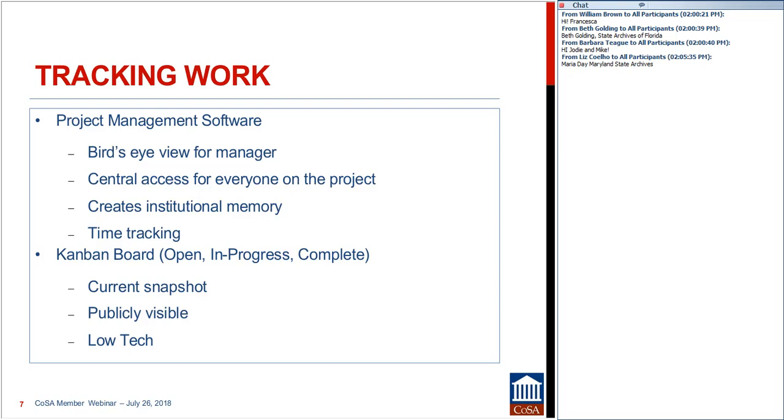though there are some virtual systems. And what this is, is a giant whiteboard composed of basically 3 columns. The first column is the work that needs to be done. This is the stuff we are working on, tasks or elements described at whatever grain size makes sense to you. Usually we do this with Post-it notes. So column number 1 has the Post-it notes with all of the open work.